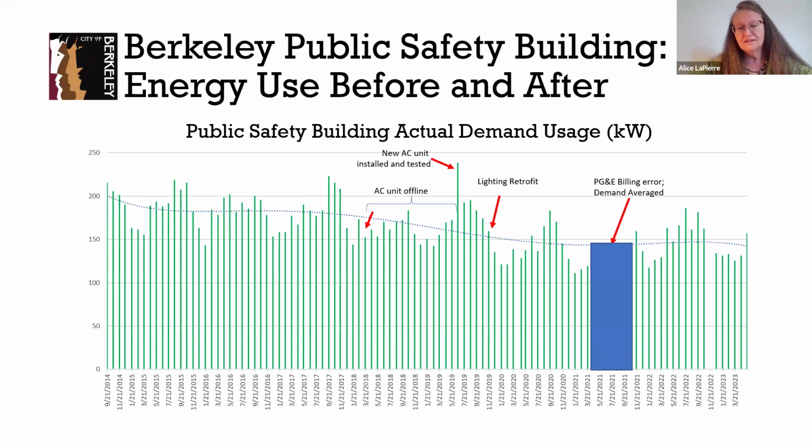And of course, like I mentioned before about having reserves of funds, it takes us a while to set aside the money or reallocate money to install something. When we did install it, you can see there's this massive boost of kW, of demand energy. That was because when they installed it and did the commissioning of the site, of the fixture, they didn't call the utility and say they were going to do this, so the utility just billed us for that. So that was a very expensive lesson, and one that all of you should take note of if you have to do a big commissioning.